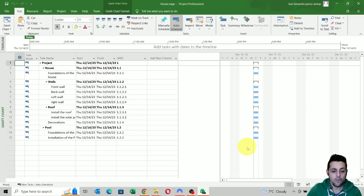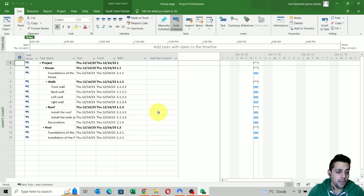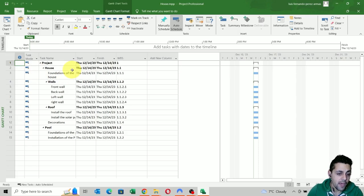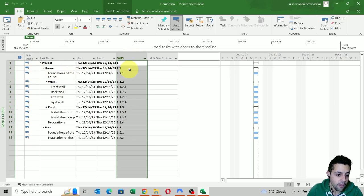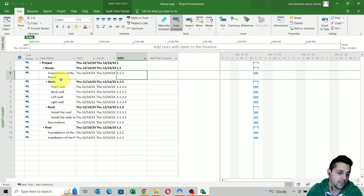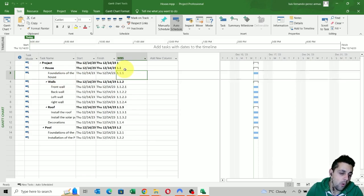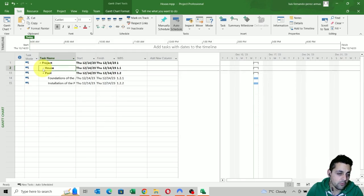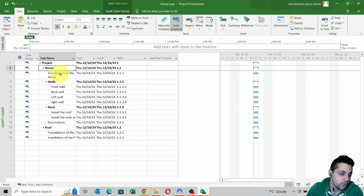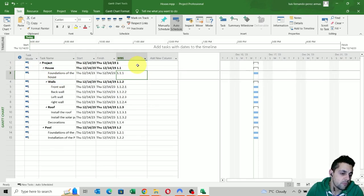To produce a work breakdown structure, we're going to need some data. Here we have the project — the house that we were talking about — already in Microsoft Project. In this column we have the work breakdown structure level for each one of these activities. For example, the foundations of the house is on level 1.1.1, which means it belongs to level 1.1, which is the house. We can notice that if we collapse the house, the foundations of the house is inside. So how can we export this data?